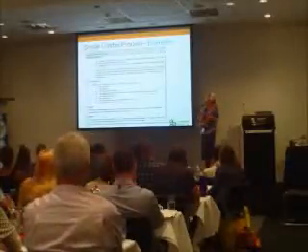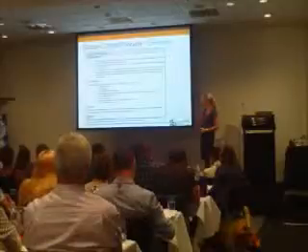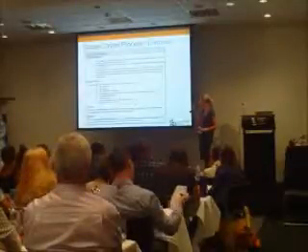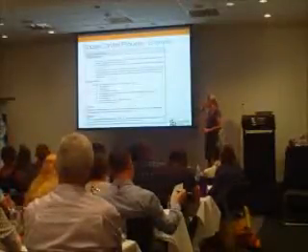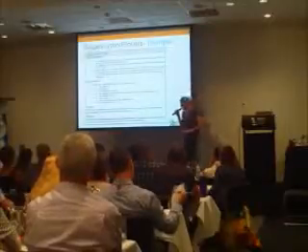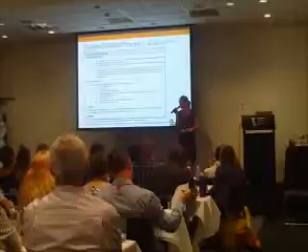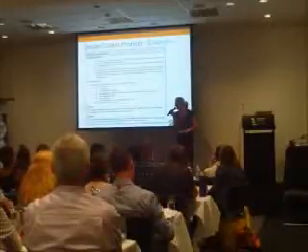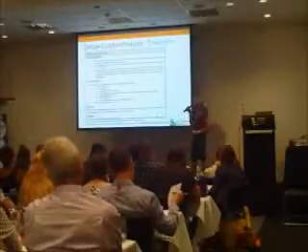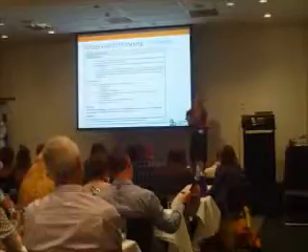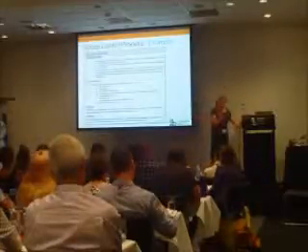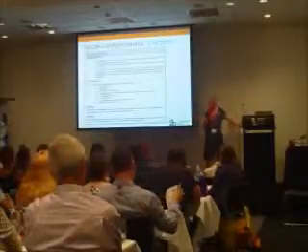And approval, the project manager should authorise the change option selected and seek approval from any other relevant parties and the direct manager prior to implementing the change. So basically they're saying if it's going to cost us money, get it in writing so someone else can pay for it, ideally. So if you were going to do a change control process for your project,